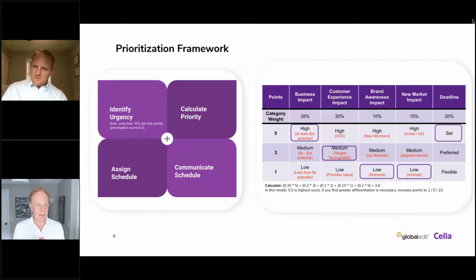Projects differ in complexity, effort, the time it takes, the business impact, and as a result, not all projects should be treated the same, and nor should they be reported on equally. Like, we've got different levels of intake, review, and different processes. Your processes should scale based on the project's need. And at Cella, we identify 3 primary categories and standards of work. Tier 1 being your highly conceptual work, your big campaigns. Tier 2, the execution of that work, or previously created ideas, concepts, or campaigns across multiple deliverables and channels. And then Tier 3, just pure production work, or edits and revisions to existing creative.